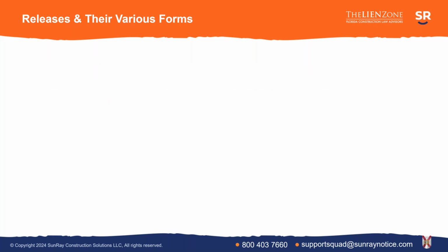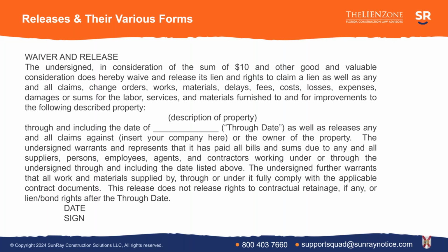Okay, so let's take a look at another release. Now, the first thing you'll notice about this release is that there's a lot more words on the page. The more words that are on a release, you should assume the more rights you're giving away. So let's break down this release so you understand its component parts. The first thing you'll see is that it doesn't have a blank for the amount of money. It has a $10 in it. And we'll talk about that $10 in a minute.